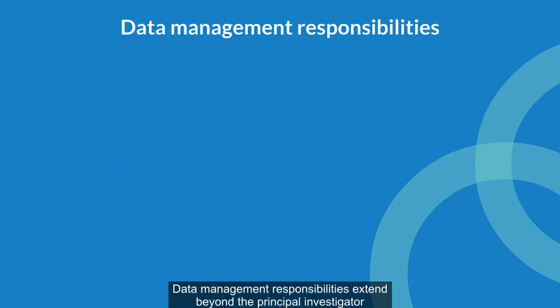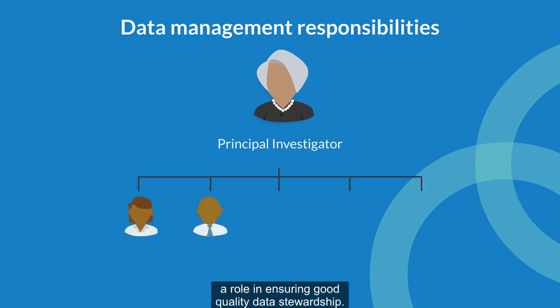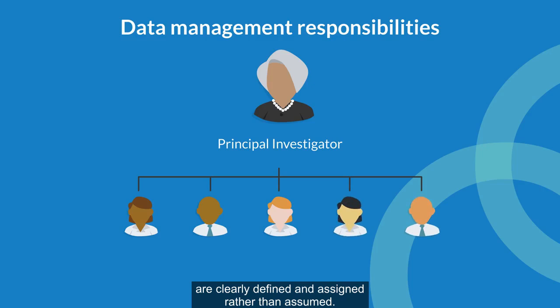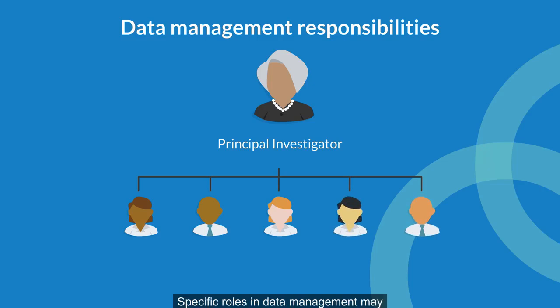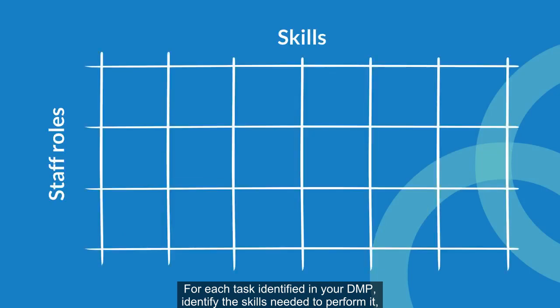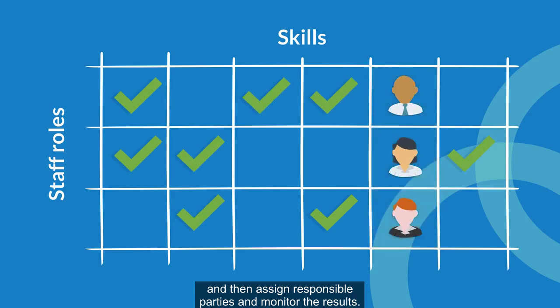Data management responsibilities extend beyond the principal investigator to include various parties involved in the research process and those who play a role in ensuring good quality data stewardship. It is essential that the roles and responsibilities of data management are clearly defined and assigned rather than assumed. Specific roles may include a project manager, data manager, and data entry operator. For each task identified in your DMP, identify the skills needed, match them with available staff, identify any gaps, and assign responsible parties and monitor the results.